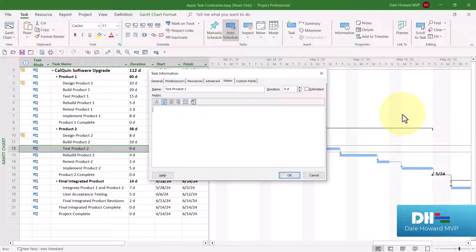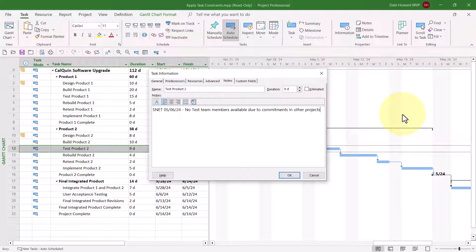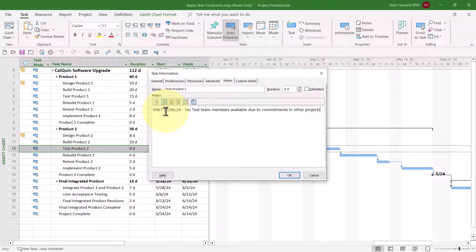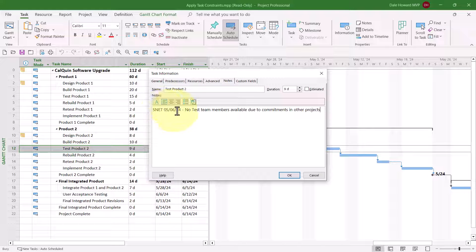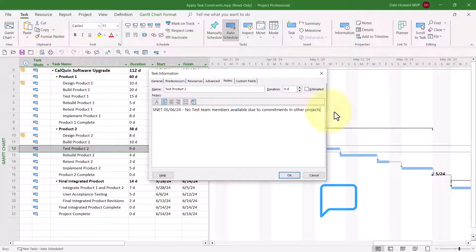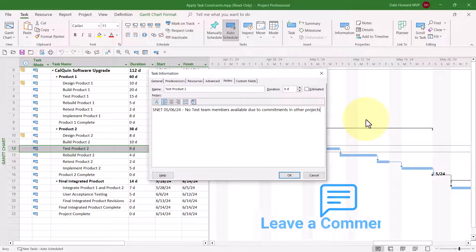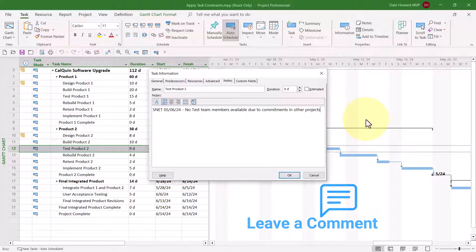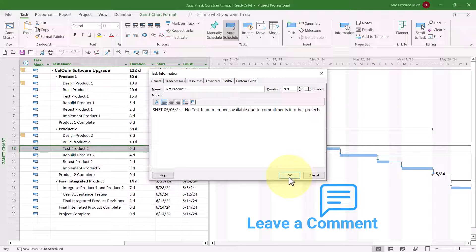Let me show you the recommended shorthand that I like to use for setting a constraint. Notice SNET, that's the acronym or abbreviation for Start No Earlier Then. There's the date, May the 6th, 2024. And then my explanation, no test team members available due to commitments in other projects.